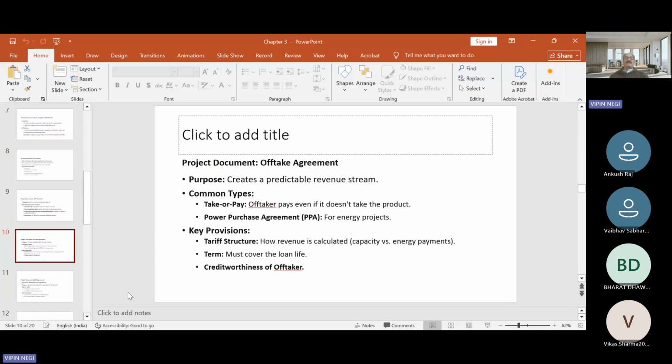Some other provisions of this PPA that define each party's responsibility and penalties in case of non-performance under agreed terms are: first, nature of the plant; second, base load or peaking plant in the power sector; third, tenure; fourth, conditions for this power purchase agreement to come into effect; and last, interconnection facilities. So these are a few responsibilities which I have to carry out.